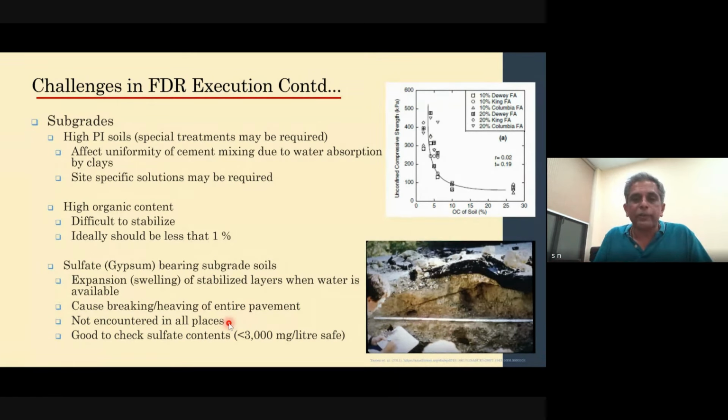So ideally, that is why I have added, along with the train that you have seen earlier, a money track along with that, which means that as the work progresses, the money also goes along with it. Only then can the work be a successful one, and otherwise it can lead to issues related to litigation and all those things. There are cases that we have encountered because of this issue as well.